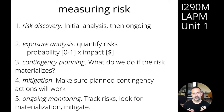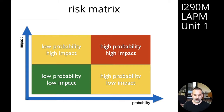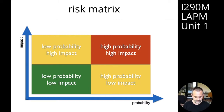One way to discover risks and perform a discovery exercise is to use what's called a risk matrix. In a risk matrix, we plot impact — the dollar amount we pay if the risk occurs — on the y-axis, and the probability on the x-axis. If you're doing a discovery exercise, you can draw this up on a whiteboard or stick it on the wall, then invite people to brainstorm risks. Give everybody sticky notes and on each one write a risk that you care about — one risk per sticky note.